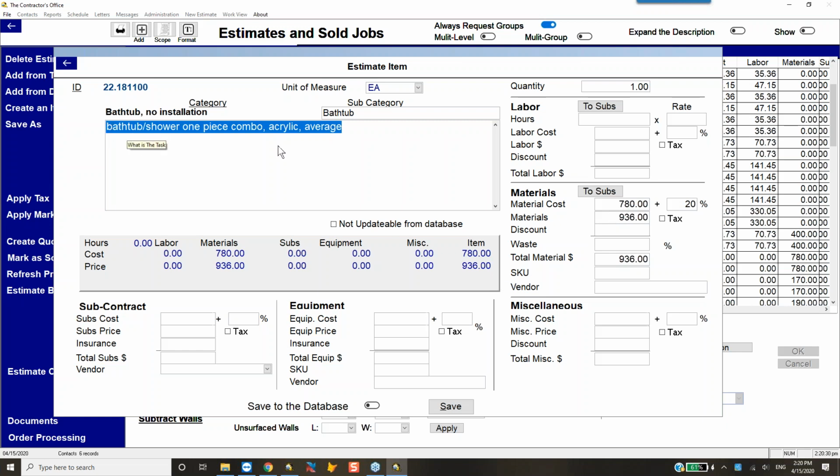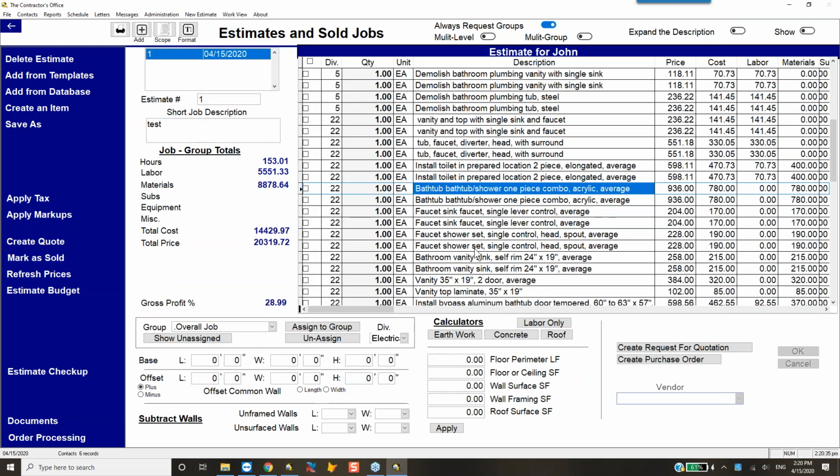So you're probably not going to get more than 20% on the tub, but you probably can get your 67% on the installation of it. If you're looking at this estimate, there's a whole bunch of 20% items here. Kind of hard to make a 40% margin with a 20% markup. So it really is indicative of what percentage of your job is high-dollar material items.